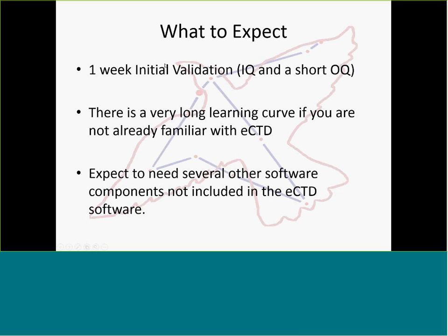So, generally, we've seen about a week for the initial validation. This is, you install it, you run through the IQ, usually it messes up on you, you uninstall it, you reinstall it, run it again, it works, and you figure out how to do a very short OQ. This depends on the system. Sometimes it can be a day, as long as a month.